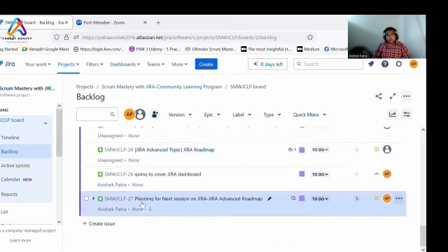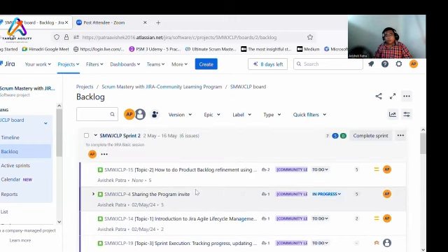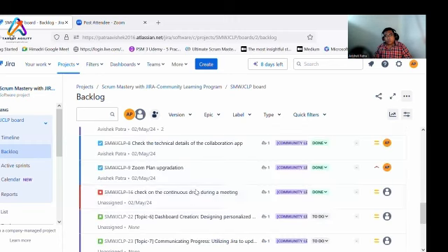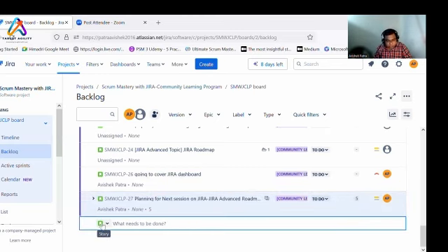Now, let's say even here, one thing came to our mind: we will also be working on a new, bigger initiative which may go on from sprint 2 to sprint 3, sprint 4. So we need to create an epic. So how are you going to do it? Even here, you can go to Create issue. If you get a green option and drop-down here, you click here, then you define what you want to get: task, bug.